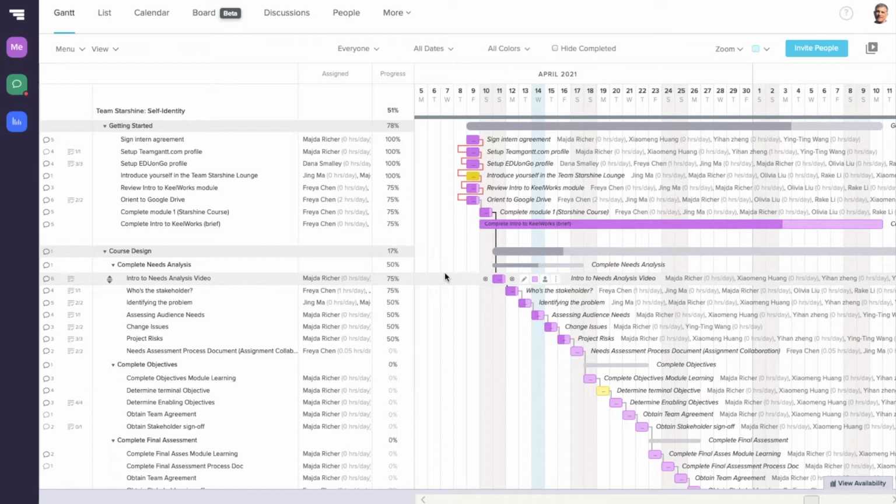An example of a task like that would be a stakeholder's review of content, particularly when you're coming to storyboard. You're not going to do development until the stakeholder says he likes what you have in mind, and your SMEs have approved all of the information you put in. They said, this is correct. It's not up to them to have an opinion on how you express the information, but the accuracy is up to them to confirm. Okay, so back here, this is the task.